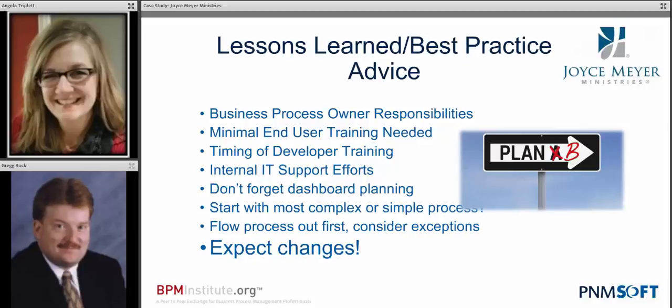One of the lessons learned we had was the timing of our developer training. So PNM looks at developers not so much as technical developers, but as those who actually create the processes in Sequence. And we did the training a little too soon. When you have training, if you don't use it within 24 to 48 hours, you actually lose that. Our training got lost because we did it a little too soon in the game.